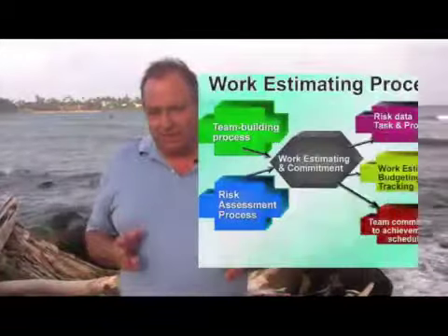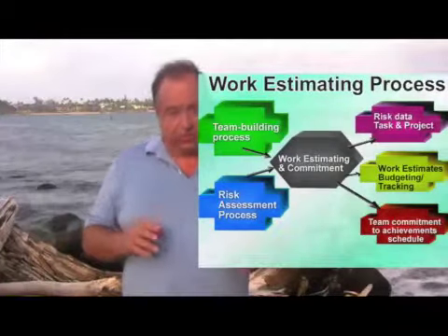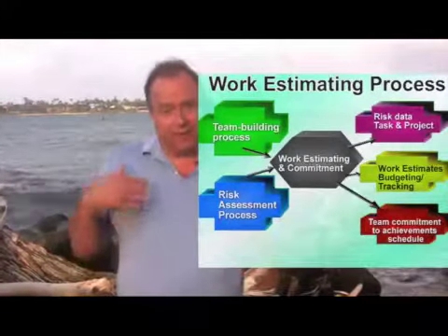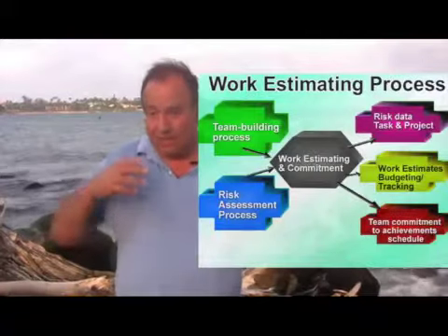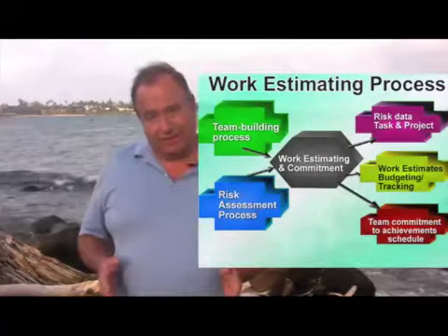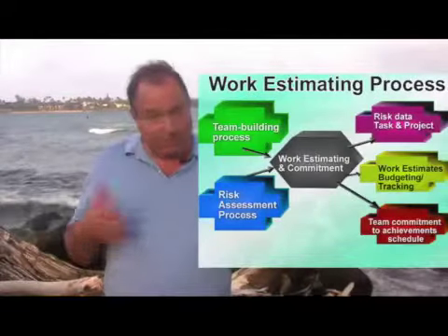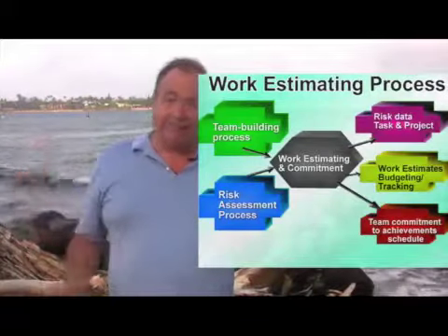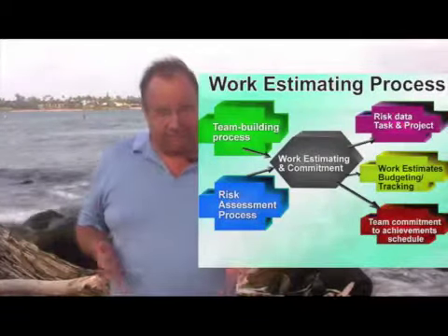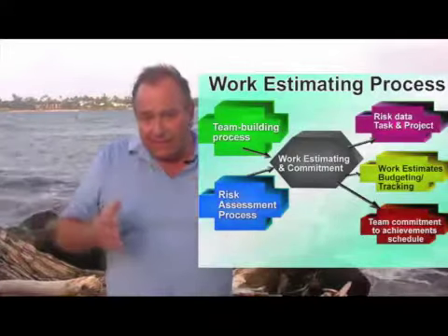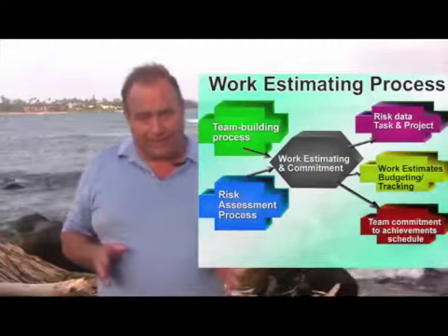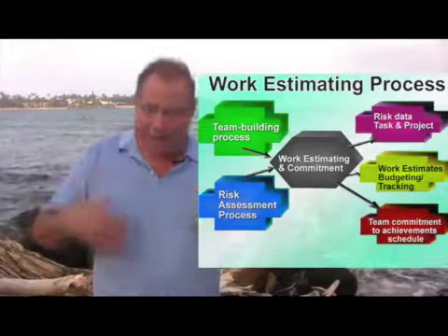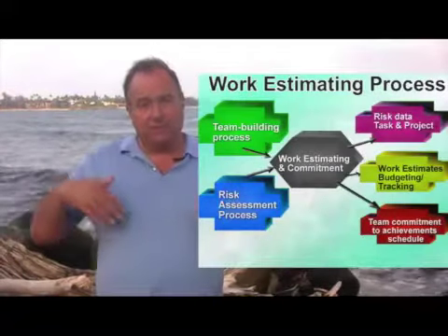Now, when we do our estimates, we're not just looking for good numbers. We want those. But we're also using this process to start building our team and the project team culture, and to start getting some commitment from people to those estimates. So the best practice is that our estimating process involves our team members. They're having a hand, a say in the estimates. And if I get a little bit of commitment from them out of this process, I've made a good start to developing a team that thinks I'm going to manage them fairly and that their assignments are reasonable.